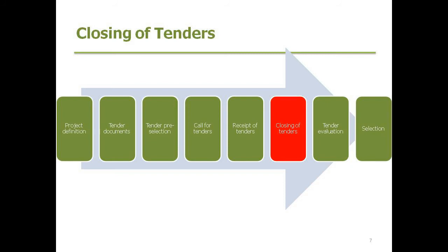At the tender, you need a fairly clear tender opening procedure where they're opened immediately, the witness, location of the tender box, where that is, and whether it's public, private or confidential as well. Also a procedure and a process for receiving late tenders, whether you will accept them or not. In most cases it's good not to accept them, but all those processes need to be made very clear to all the tenderers at the point of tendering, so that most of the time I make sure all those points are very clear on the initial tender invite letter, and they're in bold, so everybody's aware of them and